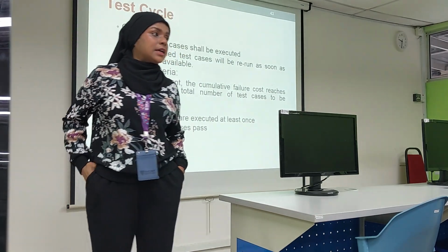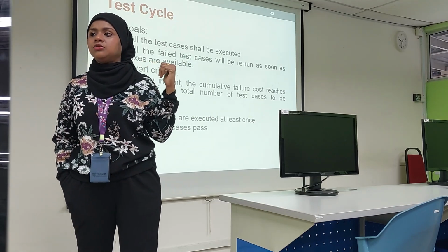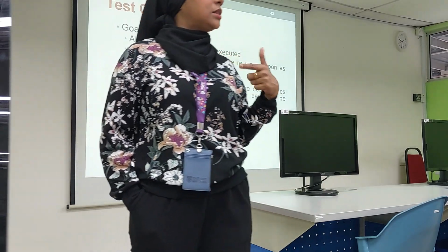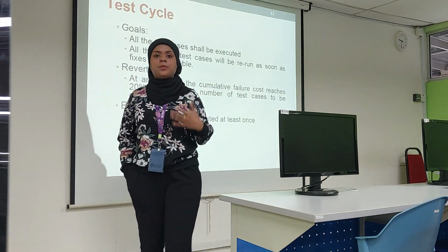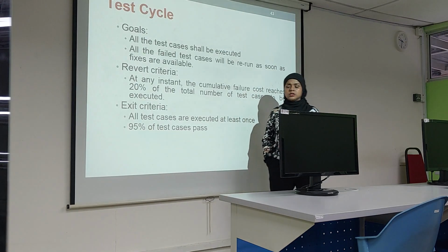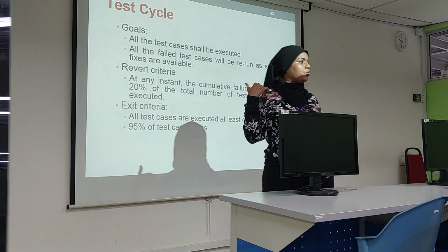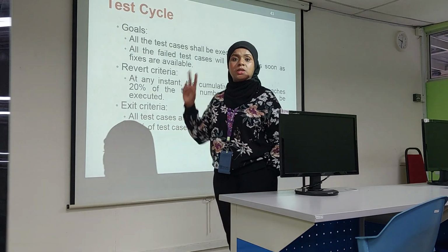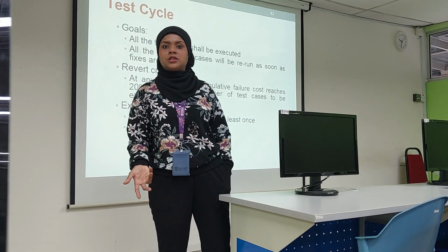So this can be part of a risk in our project. It can happen when the system is not able to continue the test. When it is not able to continue, can it cause delay in our testing schedule? Yes. Got it? So this is a type of risk which we need to check how we are going to manage. Let's assume we take another 2 weeks for the development team to come back with the latest version of the system. It means we already wasted 2 weeks. How are we going to recover? That is how we manage the risk.